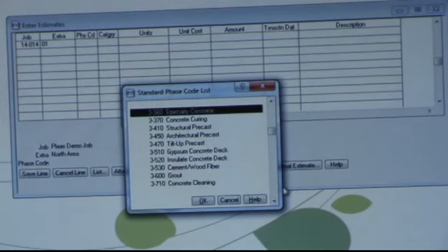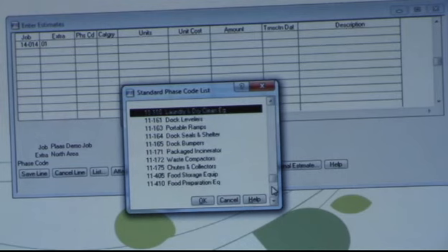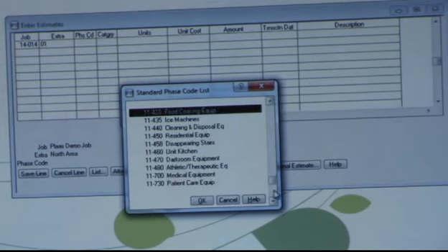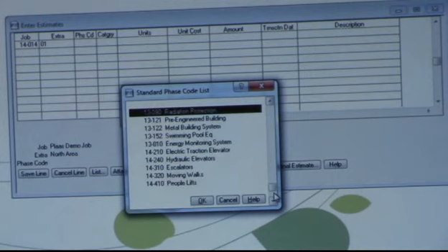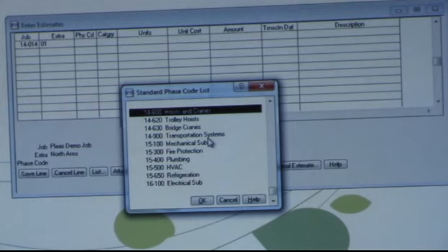My system here is a generic system with a little bit of everything: general contractor level codes and the old 5-digit CSI codes. I don't know if you're using the 5-digit or the newer 6-digit, and it doesn't really matter. Some are 3 and some are 5. Again, it doesn't matter what set of codes you're using, just that you're consistent, so you track your estimate against your subcontract, against your actual costs. If everything lines up, then your job cost reporting will work, and you can say, for this trade, what did I think I was going to spend, and what did I actually spend?